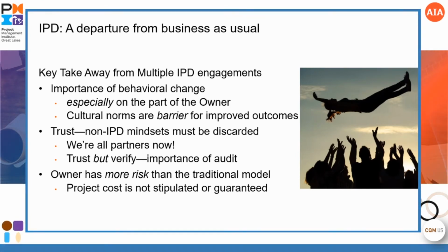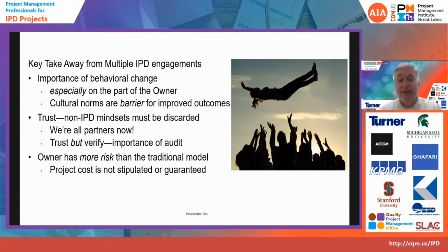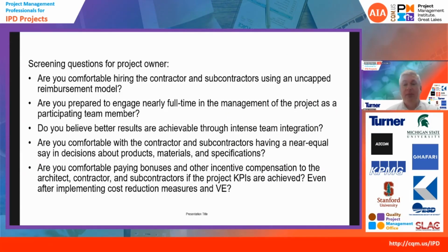And I believe, personally, that the owner takes on more risk when they do an IPD. Others may have a different perspective on this, so I'm not issuing an edict here, but I believe the owner takes on more risk than in a traditional model. And the primary thing is it's not a stipulated or a guaranteed price. So if you're thinking about doing an IPD, I developed a handful of screening questions for a project owner.